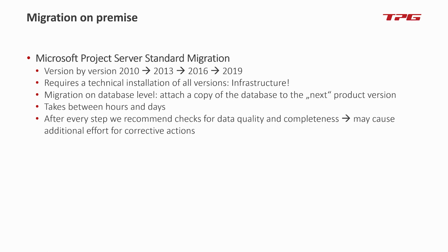So this definitely means, okay, based on some metrics that we usually generate from customer databases, we count the number of projects, we count the number of working resources in the resource pool, we look at the number of assignments and the total number of actual hours and planned hours for a given year or quarter, and we compare it before the migration and after the migration more or less automatically, and then we are sure that first of all the data has arrived in the new system.